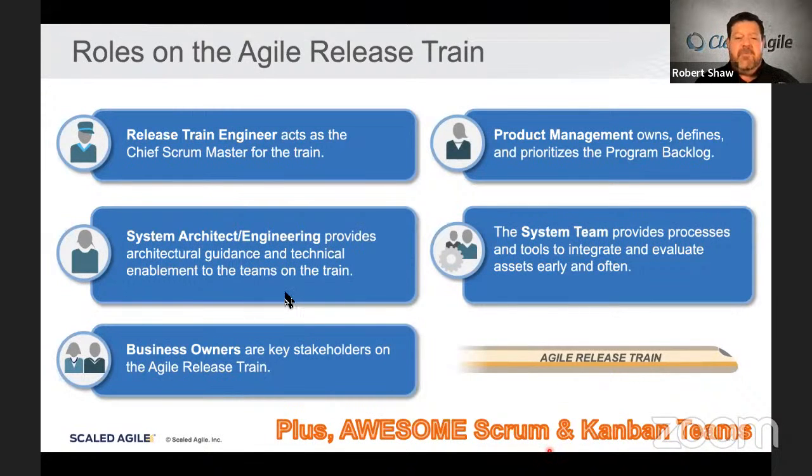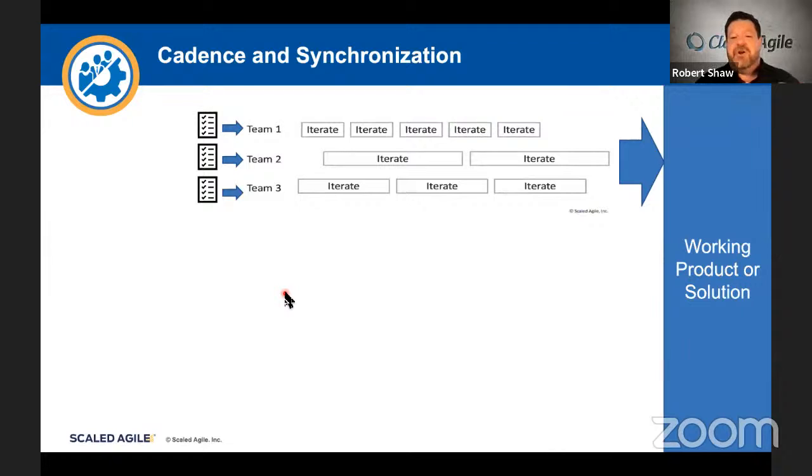So, right, when we take this agile release train, if you were just to think about a small number of teams, you take 2 or 3 teams working together, cadence and synchronization is helpful, but it's not really necessary, right? So if one team's working on 2-week sprints, they're probably okay, but they're also working with another team who's doing 4-week sprints, right? There's probably a small enough number of contact points where these guys can integrate, talk, and figure out how to get to working software at the end, right? A little bit harder, absolutely, not too bad, right?